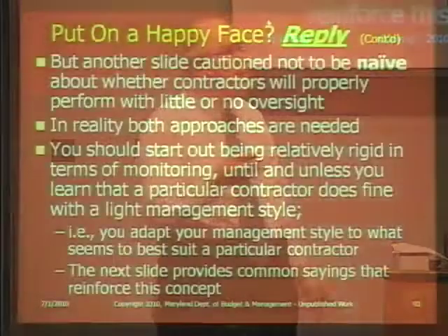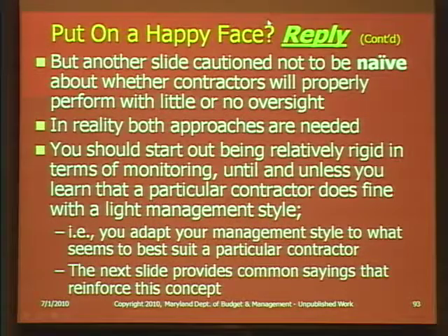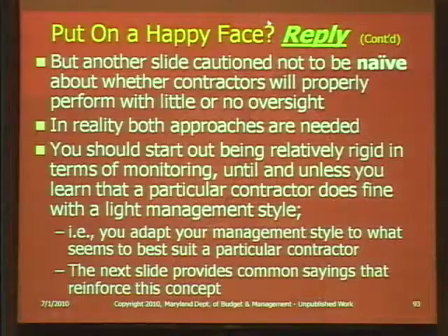You need to be prepared to do whatever is necessary. If being the nice guy gets you better results, be the nice guy, as long as the contractor is performing. If being a nice guy doesn't get results, then don't be the nice guy. You should start out being relatively rigid in terms of monitoring until and unless you learn that a particular contractor does fine with a light management style. In other words, you adapt your management style to how you're getting along with a particular vendor, how they're adapting to you, how they're doing their job.